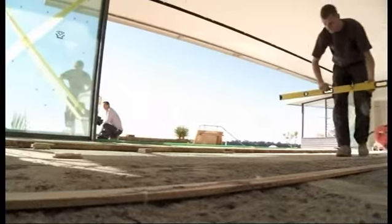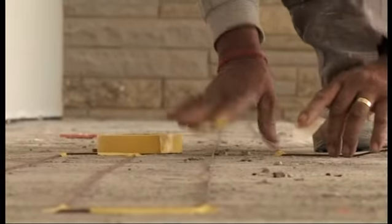Okay, we have a new plan. I have full confidence in Max and the team, so I'm definitely not interfering this time. First, an epoxy coat to seal over the old rough concrete. And while it's still tacky, the first dose of Seeker Pour-On Floors levelling compound is applied. Then the ever-patient guys from Warm-Up are back to install a new system of underfloor heating. Then another Seeker epoxy coating. And finally, another layer of Seeker Pour-On Floors levelling compound. Underfloor preparation Mark II complete. This time, hopefully, with no nasty surprises.